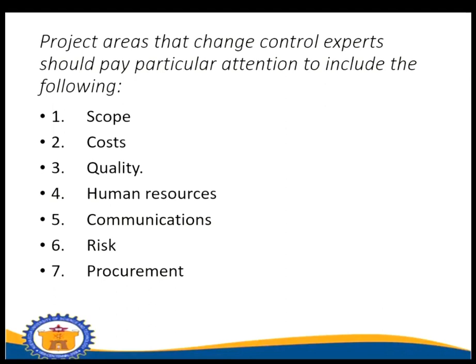Change requests must be evaluated to determine if additional or specialized labor is required. When the project schedule changes, the project manager may lose key resources to other assignments. Five is communications. Approved change requests must be communicated to the appropriate stakeholders at the appropriate time.